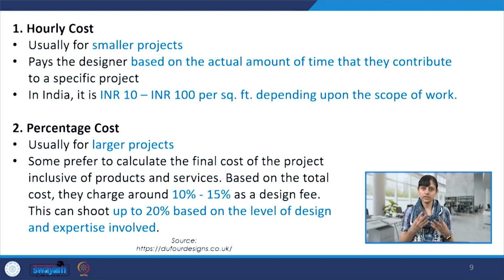So if we talk about hourly cost, it is usually for smaller projects, which are quite small, maybe just one room or a kid's nursery, or something on a very small scale. It pays the designer based on the actual amount of time they have contributed. Sometimes there may be very little scope of work, and based on the time given and the little scope defined, they are paid accordingly. And in case of India, it could vary anywhere from 10 rupees to 100 rupees per square feet, depending on the level of detailing and the scope, and what all a designer is bringing to the table.